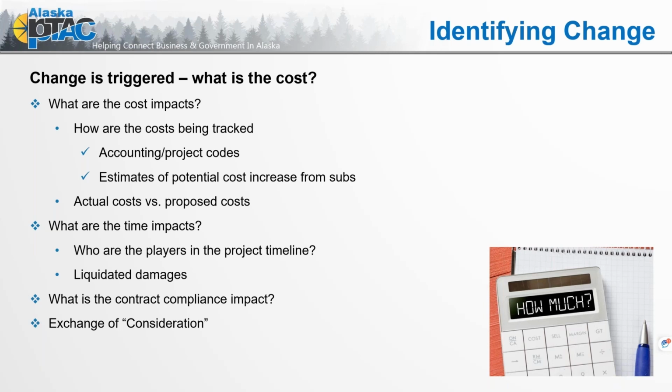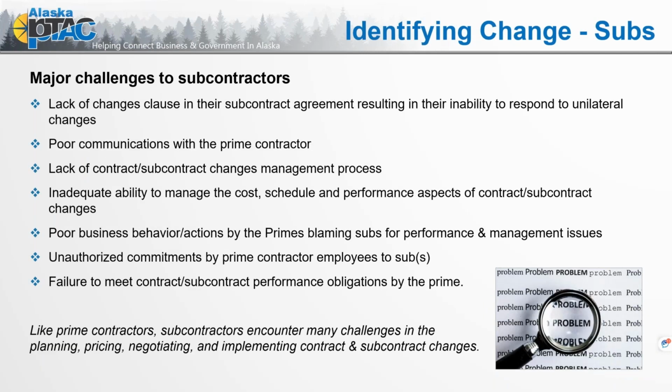All right, moving on. Identifying change in regards to subcontractors. Major challenges to subcontractors: the lack of a changes clause in their subcontract agreement can result in the inability to respond to a unilateral change. Keep in mind, an agency says you will, they're the only ones that sign, and you have a clause incorporated.